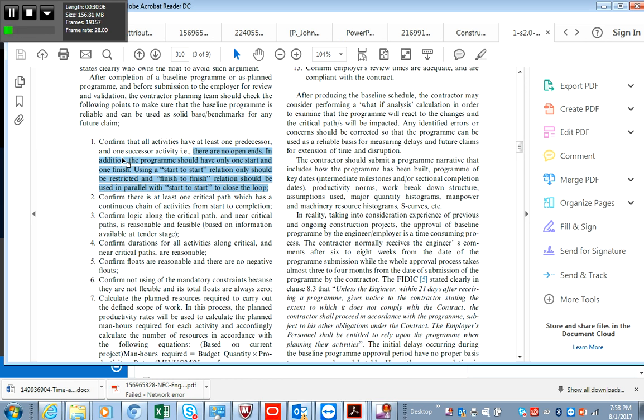So usually when you have any activities that haven't got successors, you look and make sure that they haven't got any succeeding activities that should follow them. If they do, you connect it to the successor and put a lag on it. Okay, if it finishes earlier. If it finishes closer to the time, do the same thing. As long as that becomes the driving activity, you're golden.